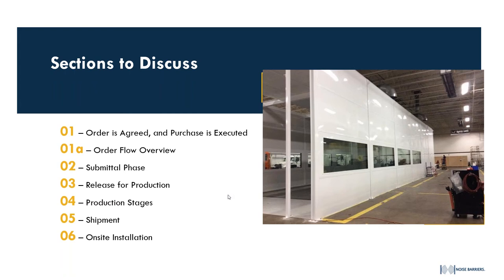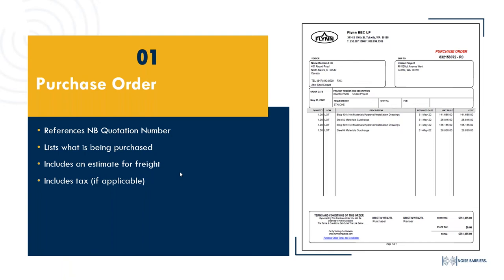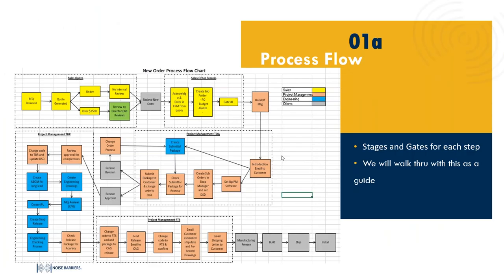We'll also touch on on-site installation. I don't have a video to share for that — we are in the process of putting one together, but I can talk you through it. For the purchase order: the PO will come with specifications of the type of window sold, size, and a description of what was purchased. It includes an estimate for freight if one was provided, and taxes if applicable.